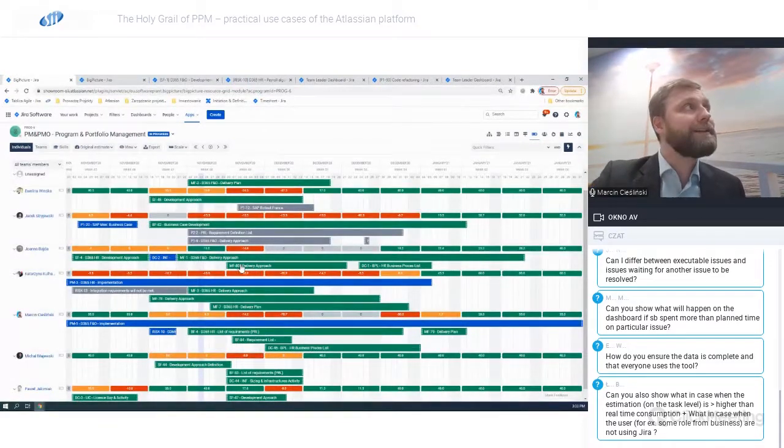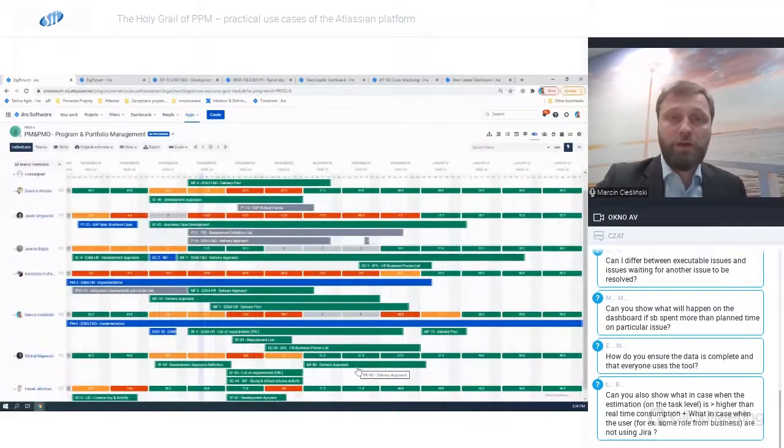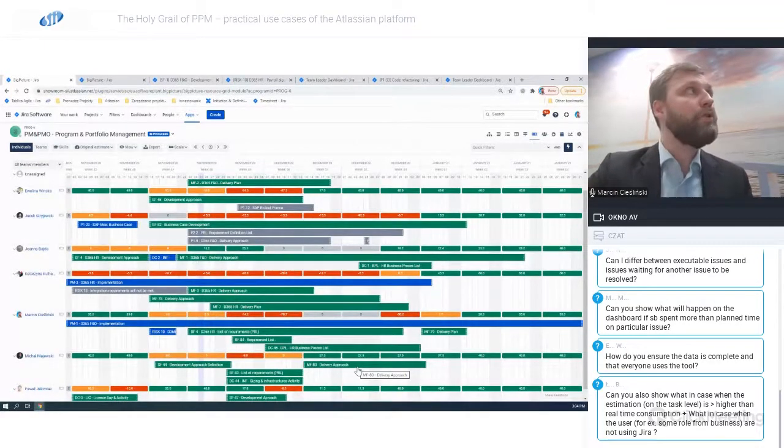Well, but prolonging doesn't really help us. Why? Because as you can see, we also take into account free time, vacations, holidays. So right now I can see that Joanna is absent on week 50, 51, and 52. So she's not going to be able to do the work. Okay, if she's not able to do the work, probably we should give it to somebody else. Maybe I will give it to Michał, but I will give it to him since week 51. Okay, so this is something we can do.